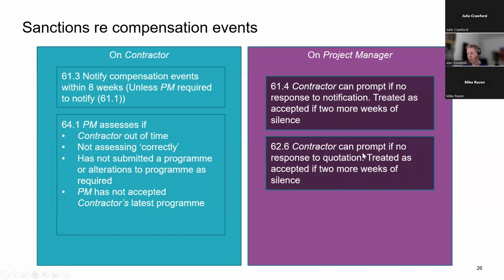And the same for quotations. If you don't respond to their quote, they remind you, 2 more weeks. Otherwise, it automatically accepts their quotation.